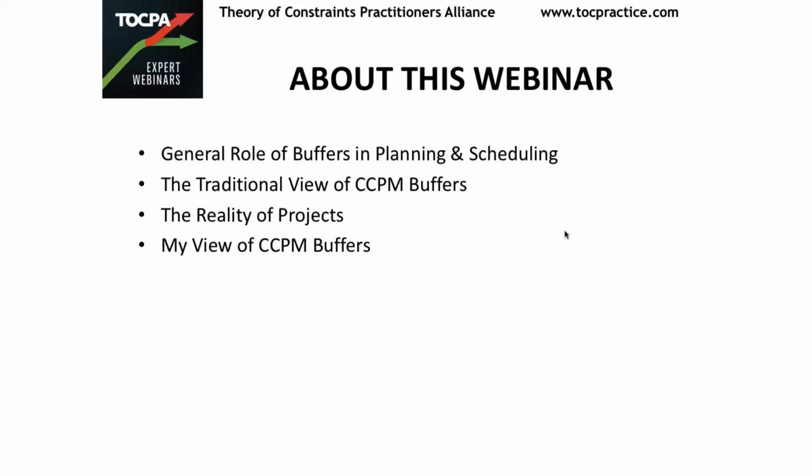You cannot have enterprise-wide or system-wide planning and scheduling without buffers, because of the simple fact that variability and uncertainty exist. And if you don't have buffers, you are on the one hand fooling yourself. On the other hand, you are creating most likely interactive constraints somewhere in the process, which will jeopardize your performance.